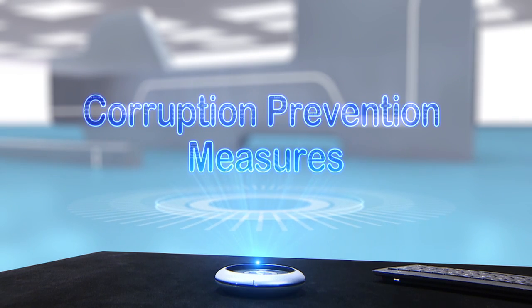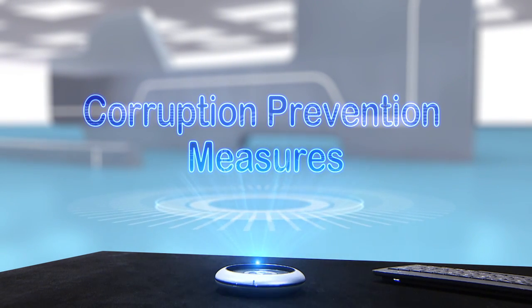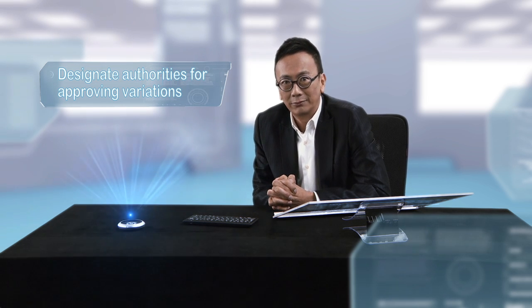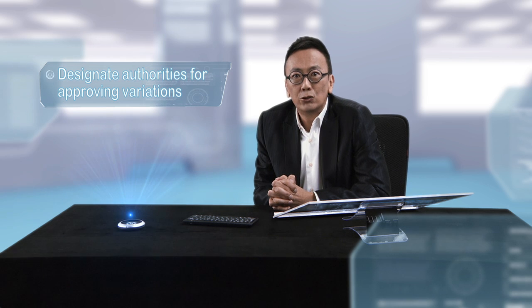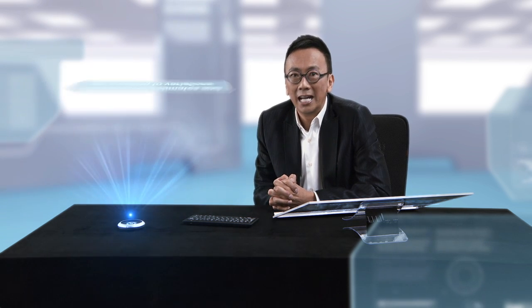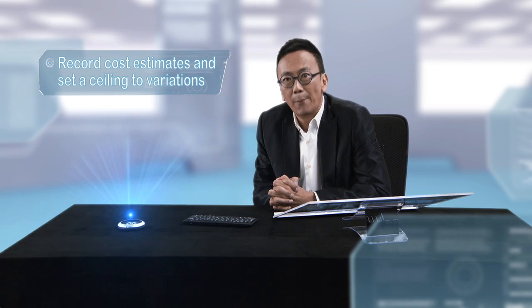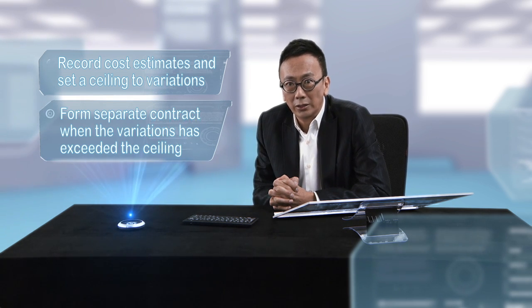The clip brings out two corruption risks. Contract variation is a corruption-prone area in contract administration. When a contractor wants to make up his profit margin after submitting a very low bid, he may compromise the project staff to obtain more payments through unnecessary or overvalued contract variations. This can include inflated costs and expenses or superfluous construction. To prevent abuse, the client should clearly designate the approving authorities for contract variations, require resident site staff to provide justifications and cost estimates, and set a ceiling on the value of contract variations — for example, 50% of the contract. Works exceeding the ceiling should be let under a completely separate tender.